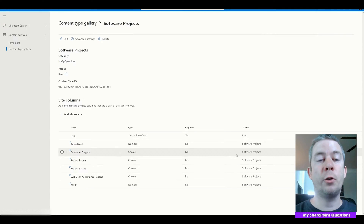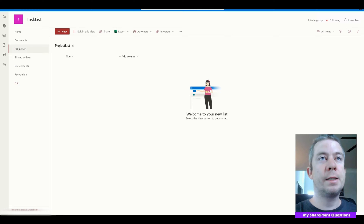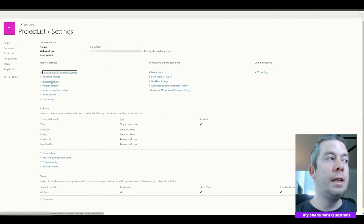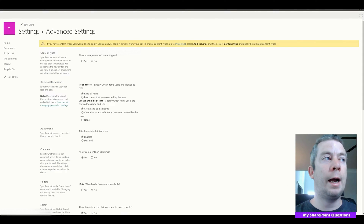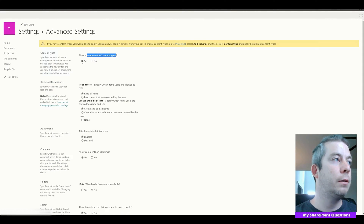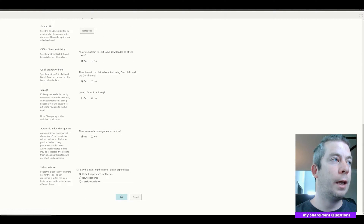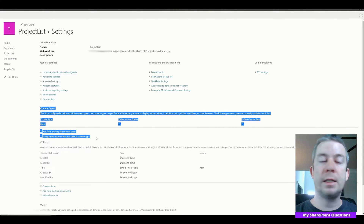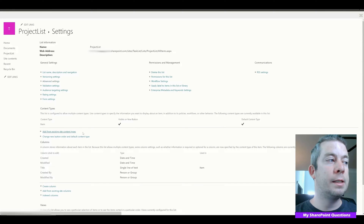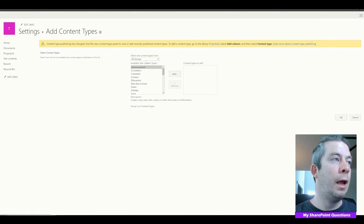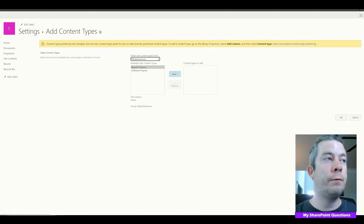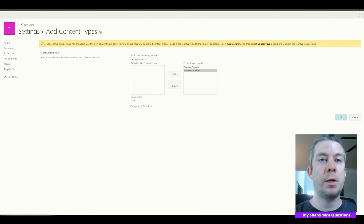Now let's go back to SharePoint and associate these content types to our SharePoint list. I'll go to Settings, List Settings, then in Advanced Settings we're going to allow the management of content types — I'll say Yes and click OK. A new section has now appeared: our Content Types section. We'll add existing site content types, select our My SharePoint Questions group, and we have two: Regular Projects and Software Projects. We'll click OK.